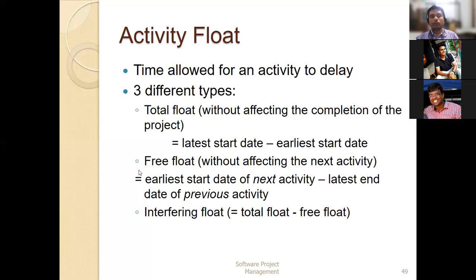The second one is the free float, which is without affecting the next activity, that is, the upcoming activity. It is the earliest start date of the next activity minus the latest end date of the previous activity, and through that we can identify the free float.